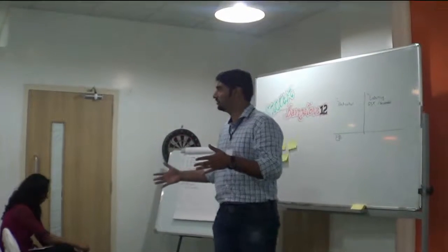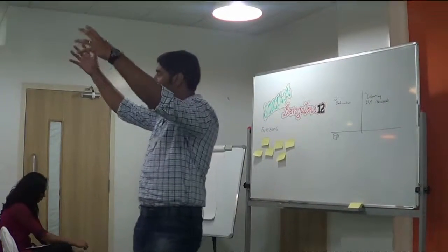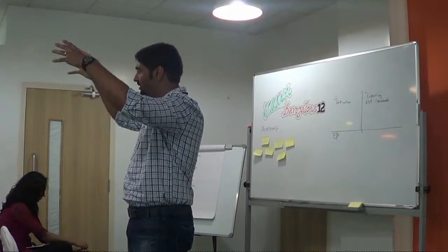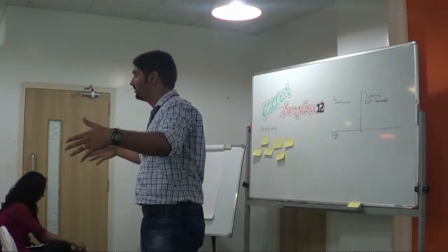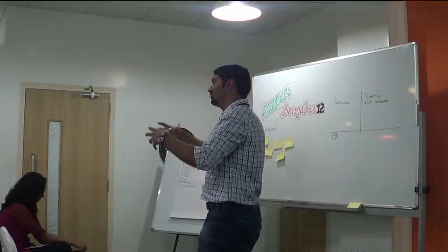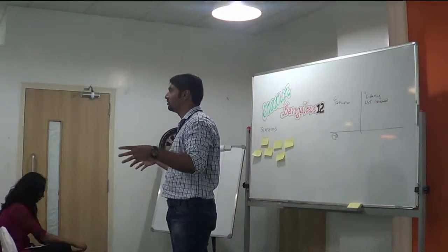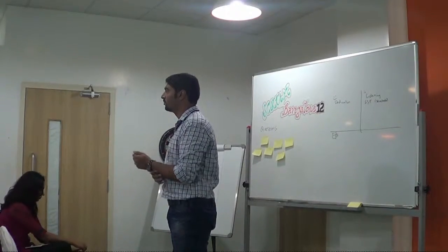Okay, so the general idea would be, in order for all teams to work within a program, you generally need to have the same story point definition. Right? So what you have at the program level is basically a super product backlog, right? Which then trickles down to the teams that you have. So then you do a cumulative effort kind of thing, and then break it down into stories. So each team used to have the same relative sizing? Yes. That's only when it works? This is not designed to work on a program.